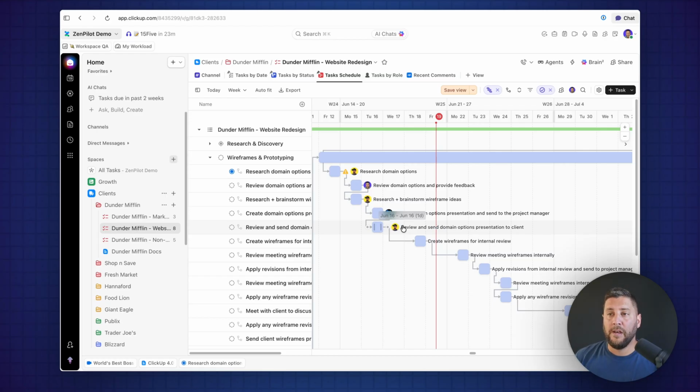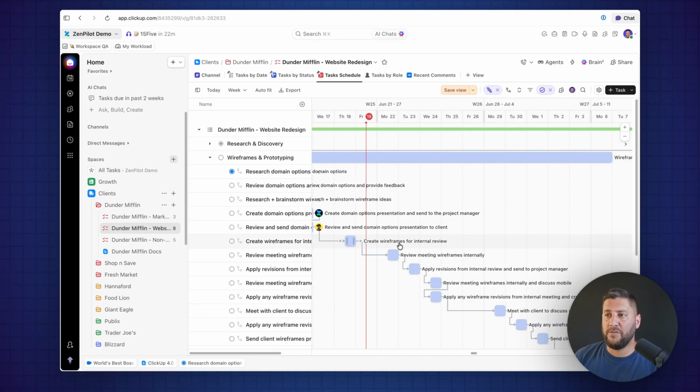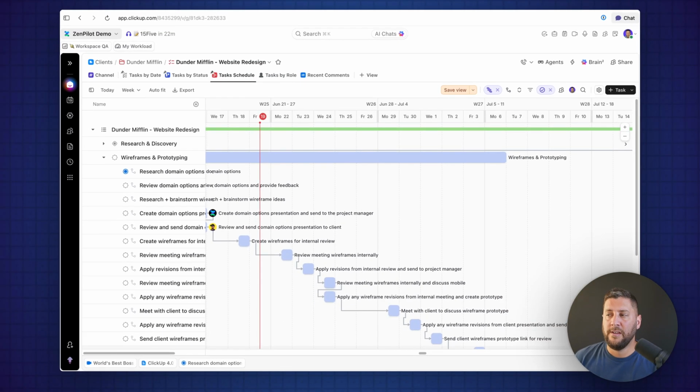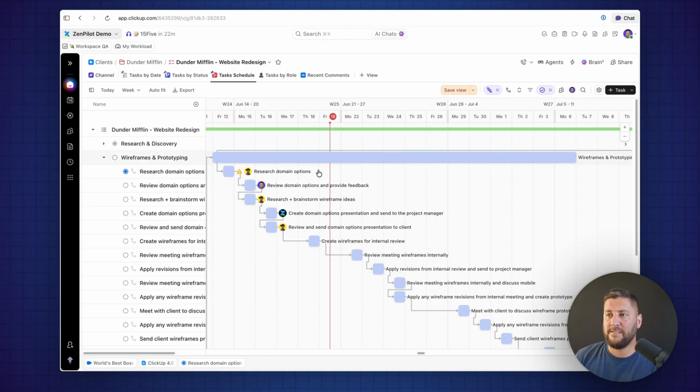Not all the time. One of the features that I didn't mention with this new scheduling engine and what that has allowed is this baseline feature. We talked about this in a prior episode of ClickUp Weekly. But with baselines, one of the reasons that teams did not want these to be synced up previously was, well, what if I had to move subtasks and now they're happening way behind the parent task? Well, I still want to see when that parent task needed to be done. Baselines now allow you to get that answer without having to have your actual work be out of sync in the system. So all of this stuff ties together and is super helpful. But I just wanted to give a big shout out to the ClickUp team for their work on improving this.